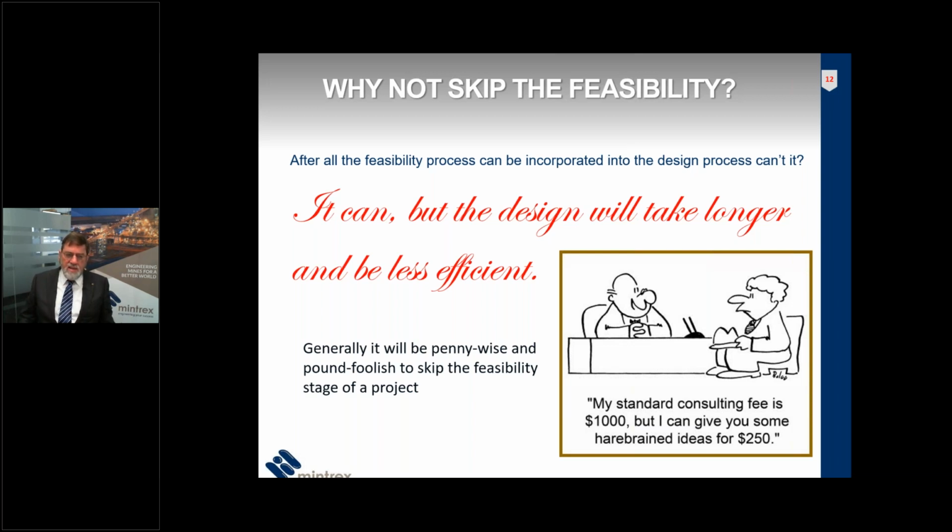Feasibility shortcuts are penny wise and pound foolish. Design is a very expensive process with many highly skilled people involved. There will be more than 40 people in an average size mining project involved during the detailed design process.